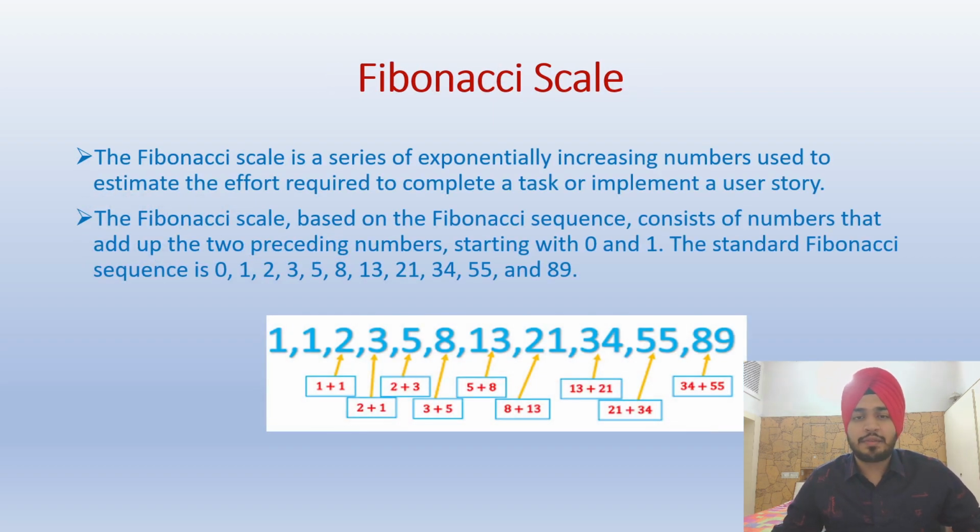So let's discuss the Fibonacci scale. In the Fibonacci scale technique, we estimate the effort required to complete a task or implement a user story. In this technique, the next point would be the sum of the previous two story points.